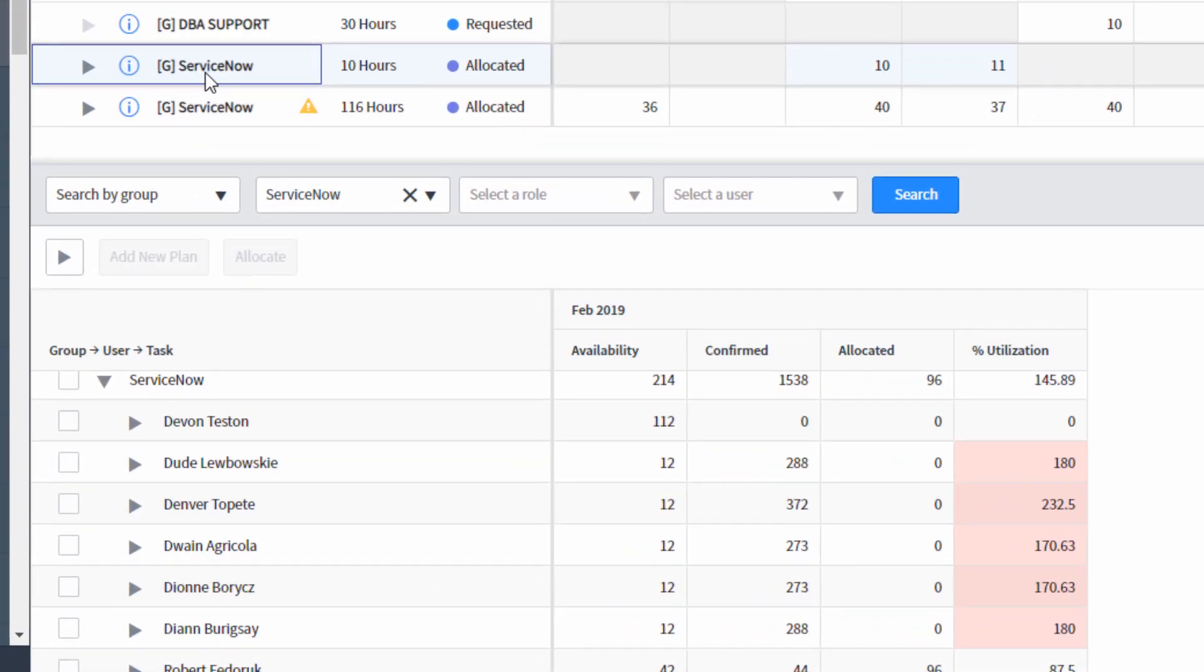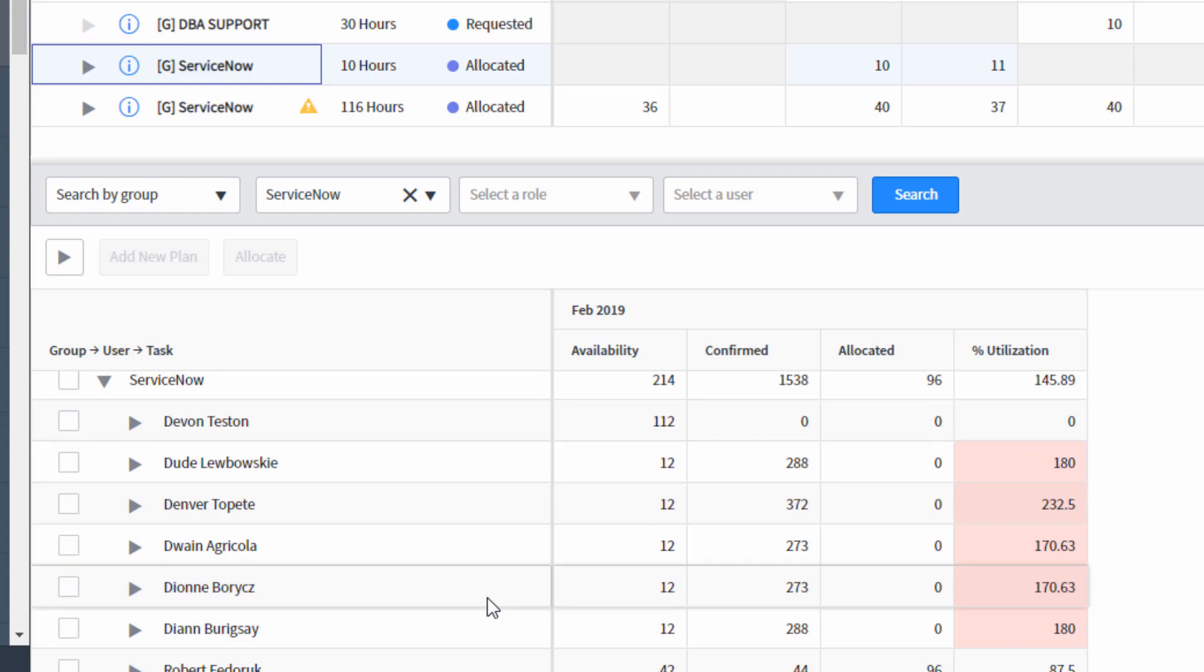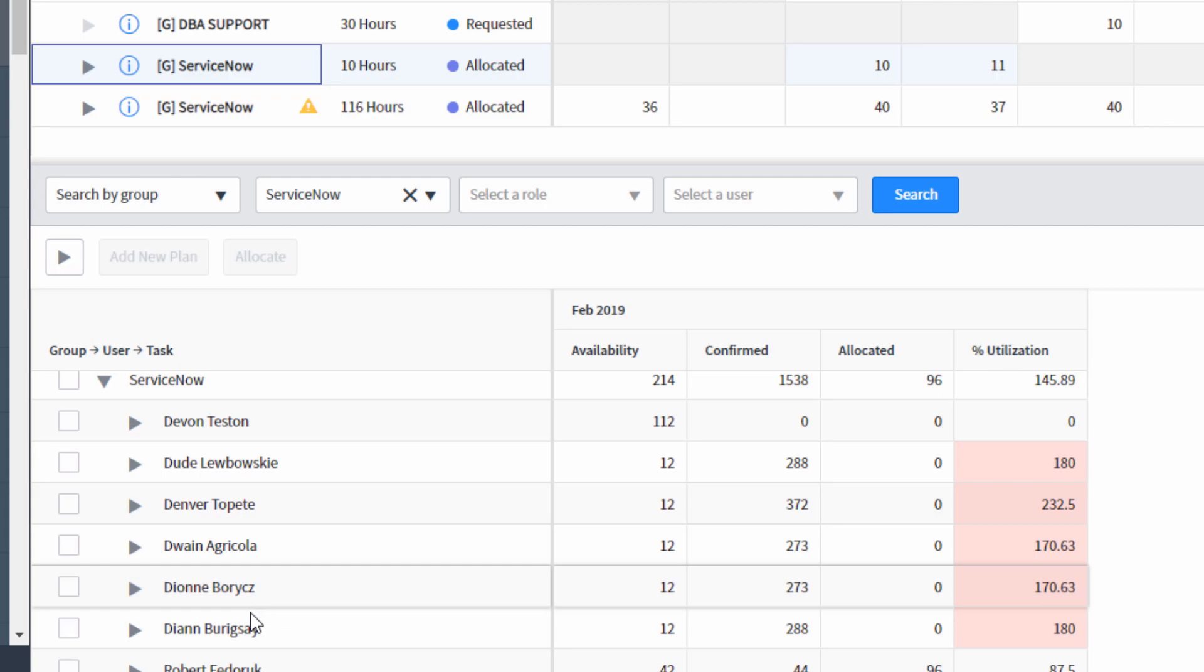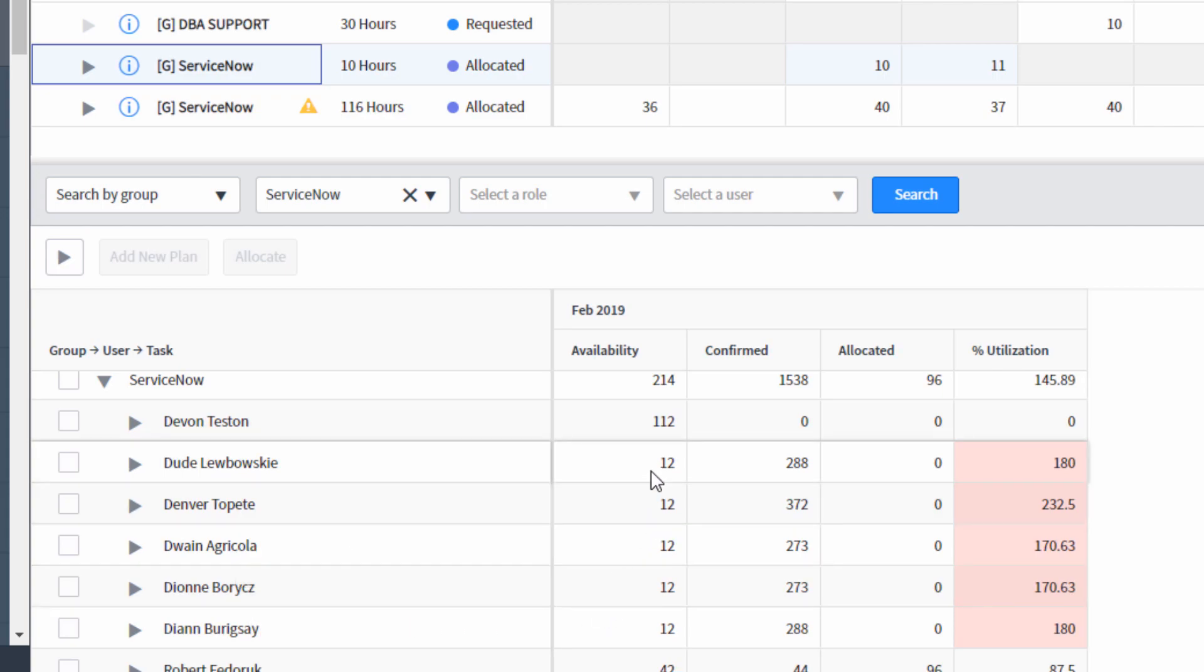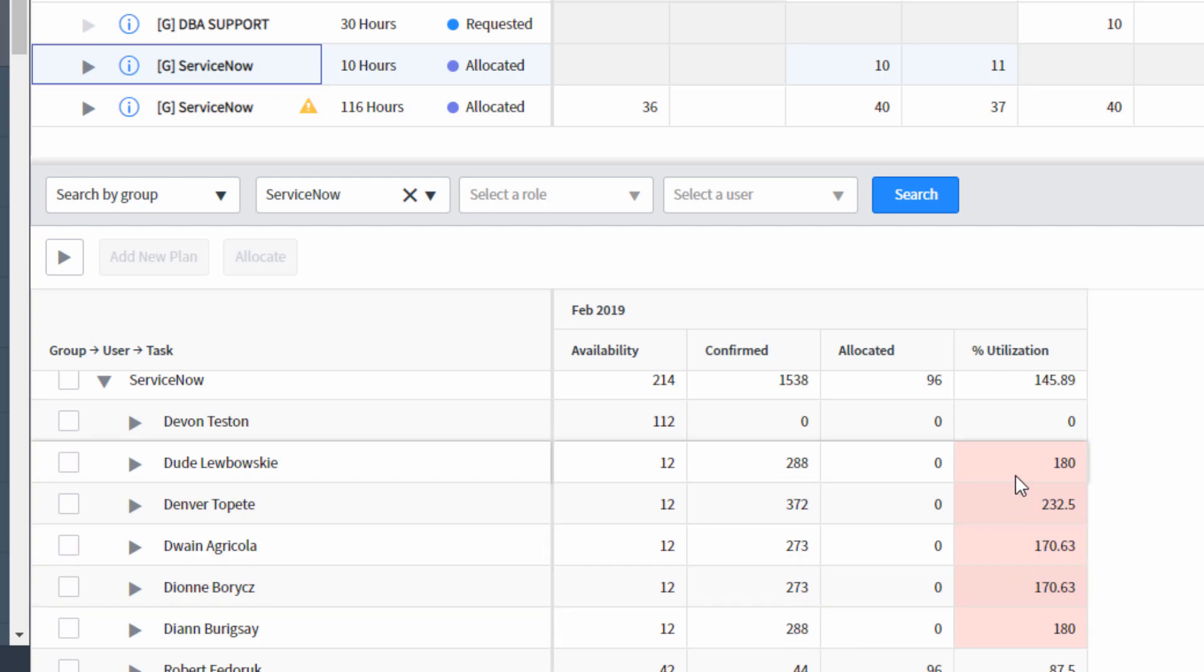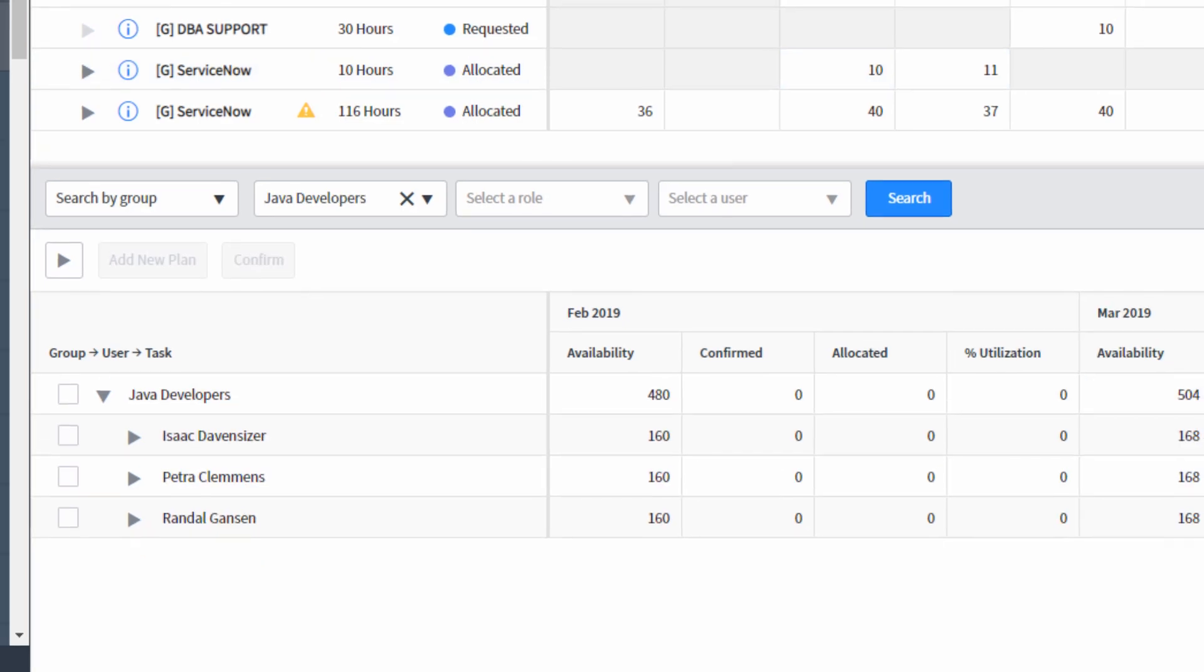A far more interesting case, I've picked the ServiceNow team. And we could see that these people—Dude, Denver, Dwayne, Dion, and Diane—all have low availability, high amount of hours confirmed, which has put them way over on their percentage utilization. So the resource manager, as they are confirming and allocating resources, have a lot of intelligence available to them in order to make the best decisions for the project.